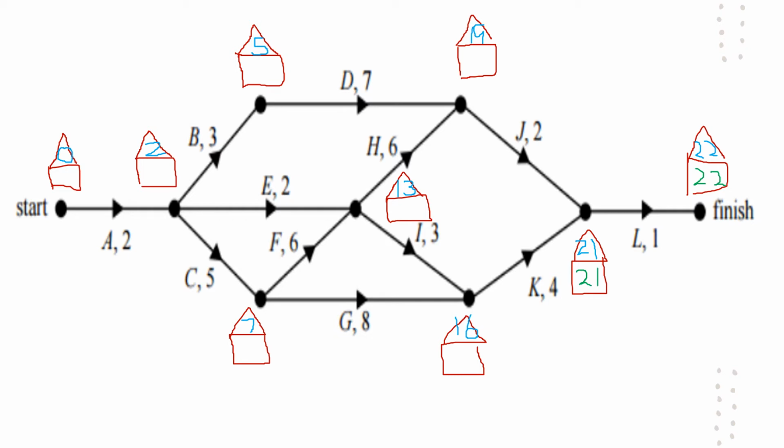My next option is we'll follow path of J. So 21 take 2 is 19. If I followed K, 21 take 4 is 17. My next one, I have two options coming in. So from 17 along I is 3, so 14. Or 19 take 6 is 13. So again, as I said, we go through that and do the smallest value. So that one will be 13.